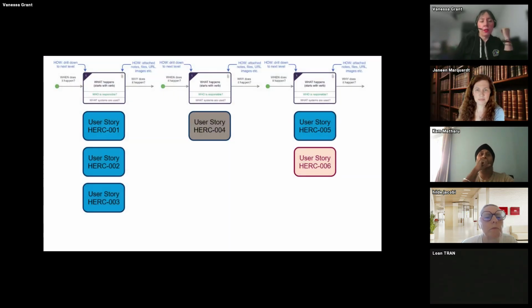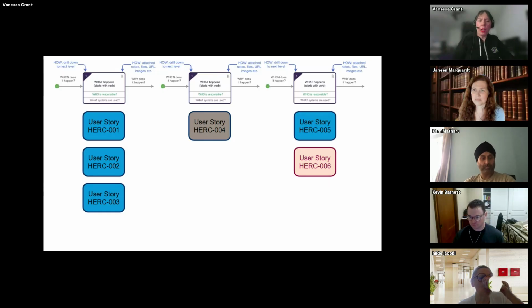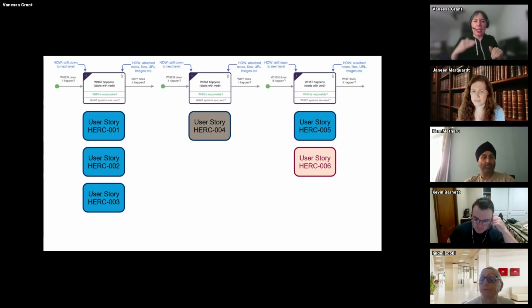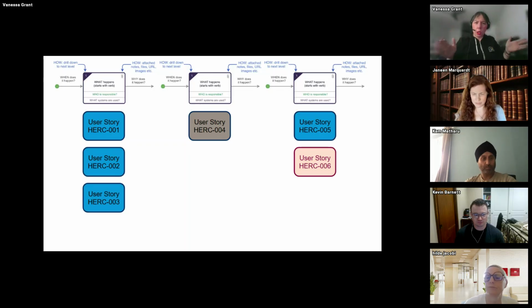So, as an example, this is what I worked on in a really big project. I worked with a great solution architect, and what she did, which I thought was brilliant, is that she would actually lay out her business process map, just long lines, step by step at the top, and then on the bottom, she put all the user stories that were associated with that particular step. It made it really easy for everybody to see where we were at for each user story, which steps were completely built out, and were there any blockers? For example, we used some color coding. Red was blocked, maybe blue is done, but you could use color coding, and it just visually was so much easier, especially for a large project, to follow where we were at in that particular project.